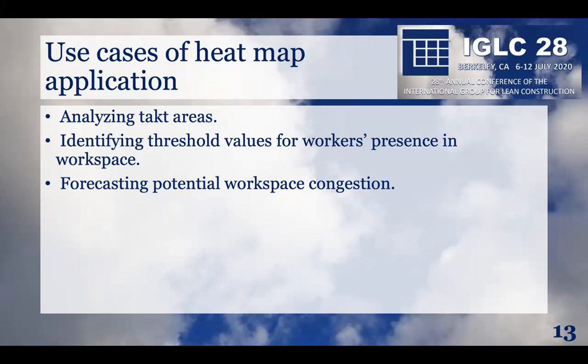Because heat maps are generated on the basis of density, the actual threshold minute can be calculated according to the heat map of that worker in question, where his or her workspace is detected. Therefore, the density of the presence of the worker in question should be an indicator of the actual threshold value of his or her uninterrupted presence.